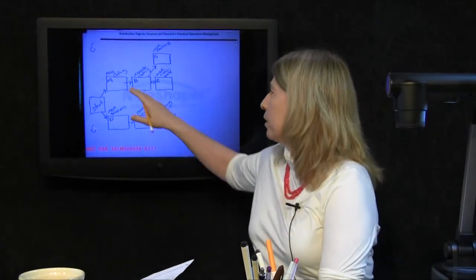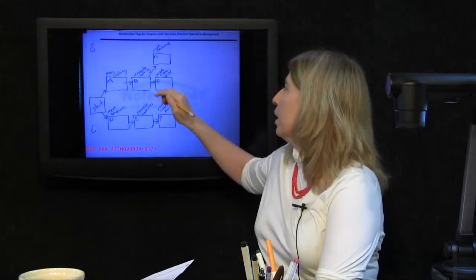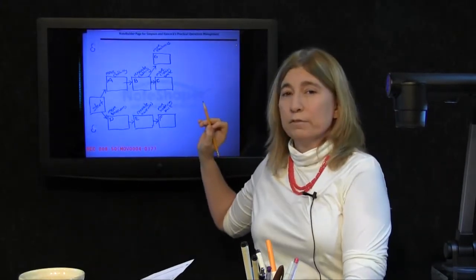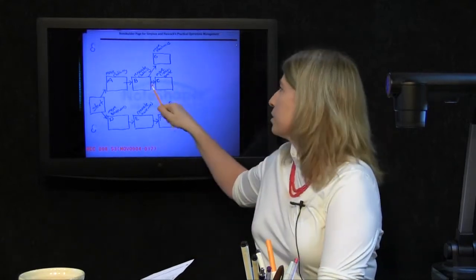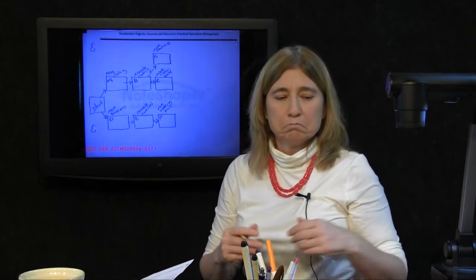Oh, so this is actually an interesting little fact about the Mega Mart story, if you will. We moved clothing out of its area. We renovated the clothing area. When the clothing area is renovated, that's task B, notice that you can simultaneously, if you want to, this is what the network means, start moving the clothing back and start moving the electronics out of that area. You can basically evacuate that entire electronics area, and that's not any kind of conflict. Nope. Apparently, from what we're told, that would work. That's fine. Okay, G's on the network.